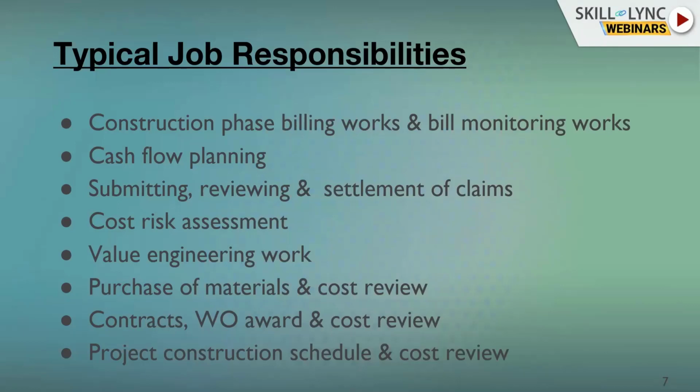Submitting, reviewing and settlement of claims. The contractors will submit claims for variation works and changes. Then the cost controller needs to review these claims, and as per the actual condition, the claims have to be settled. This is one of the responsibilities of the cost controller. Then cost risk analysis and assessment. The cost risk associated with the project has to be worked out, because the project budget is frozen, and if there is a cost overrun, then the cost risk assessment has to be worked out, and management has to be apprised accordingly.